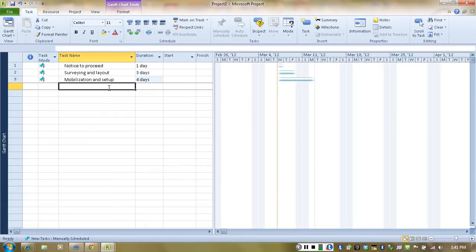As you can see, we have entered 3 activities so far, and you have here the timeline, the data date or the cutoff date, as of which I'm entering my durations. I have here the activities that appear in these bars, but all the activities appear to be starting on the same day, which is not exactly what I'm looking for. So what I'm going to do now, I'm going to do 2 things.